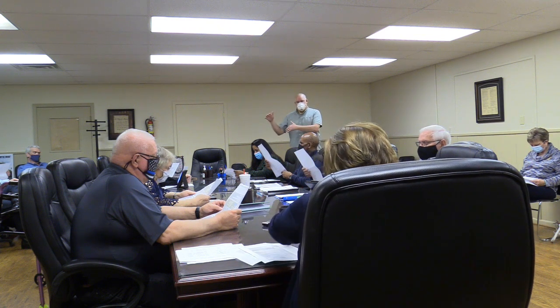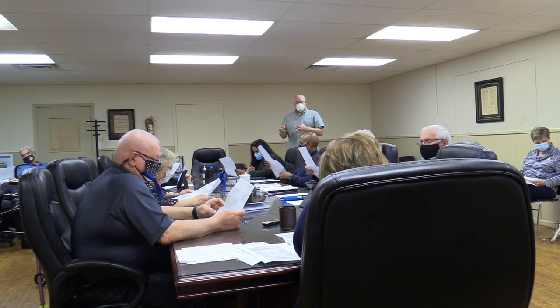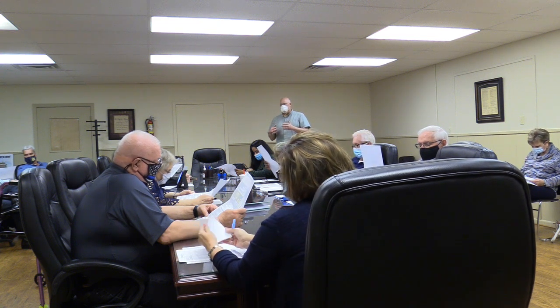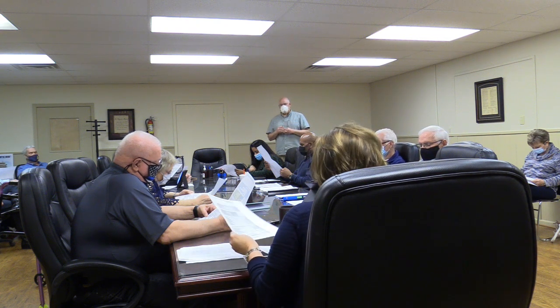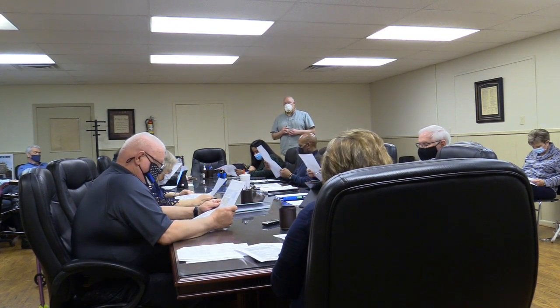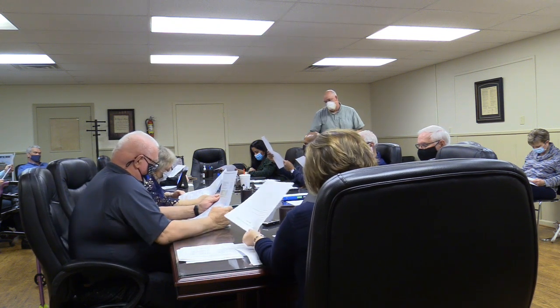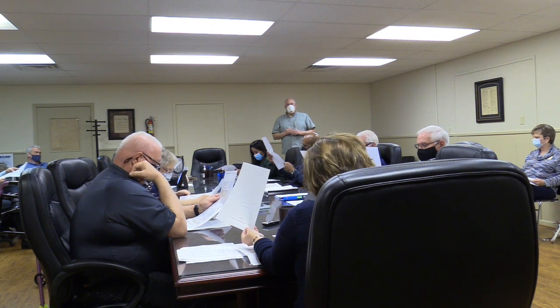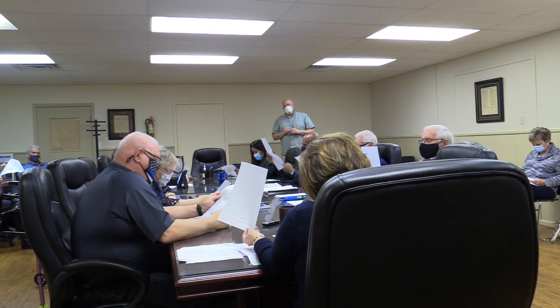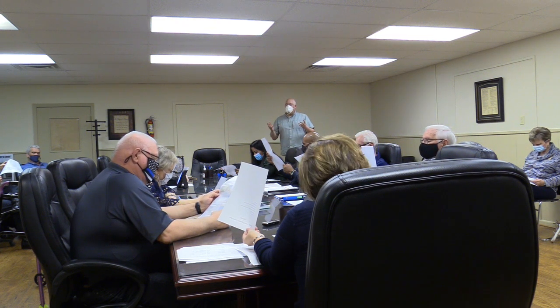The overall spreadsheet has the Blytheville Courthouse at the top, but you'll see in the center section it covers Osceola as well and all the changes there. In the lower left corner, you can see where we have summarized the re-roof project and the obligation of $2 million to Osceola and how much has been spent on the re-roof project to Osceola. We've exceeded that $2 million obligation with the changes that we've done to Osceola. And we have in front of you today to consider another change order for more repairs to Osceola, which are related to waterproofing, if you will approve it. So at the bottom line there, line number 104, in the lower right corner, there's $500,000 that's undesignated. That is not called for in any specific budget. It's just more contingency, I guess you can say, between the two projects.